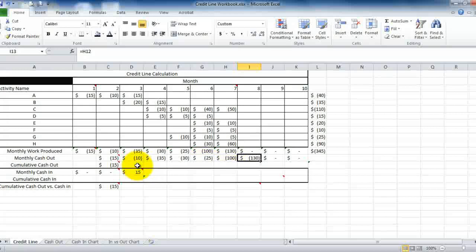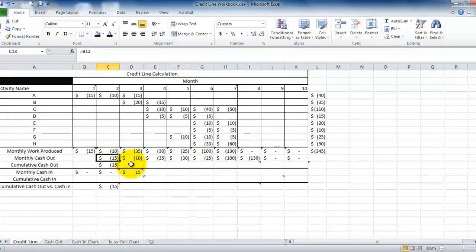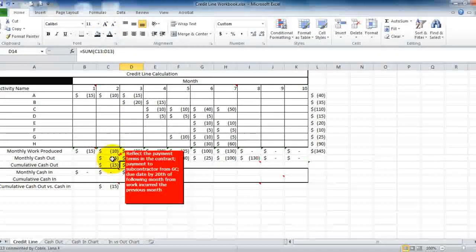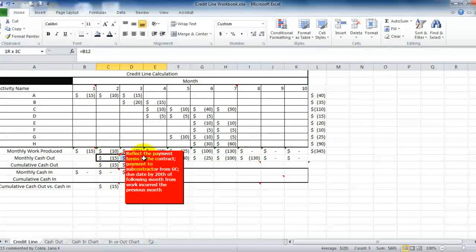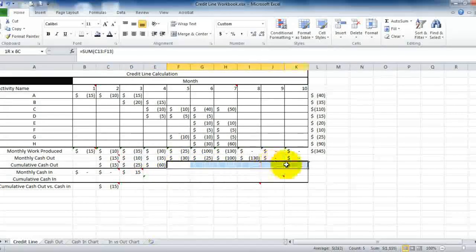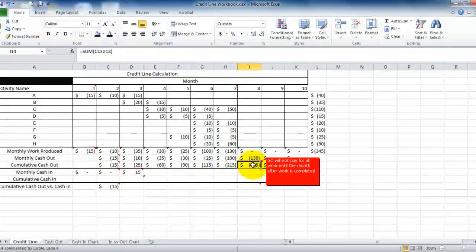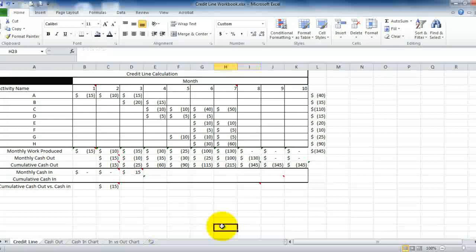Let's now talk about cumulative cash out. Your cumulative amount of cash out builds each month — if you go to month three, your cumulative cash out is going to be $25,000 because it's the sum of the two periods to that point. It reflects the sum of those three numbers: 15, 10, and 35. We carry it all the way over, and in this particular example your total cash outlay doesn't catch up until month eight, when you have already finished all the work — the work was finished in month seven.